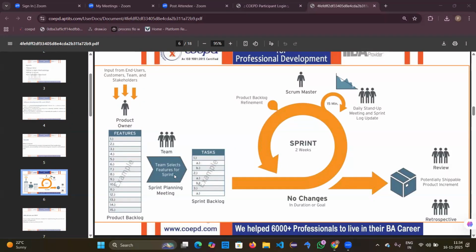Sorting means if any particular user story is repeated or any duplicate user stories are created, then he will be responsible for deleting them, and that is called sorting. Prioritization is deciding which user story to be developed first. That will be done based on the values that we got, the BV and CP values. We will analyze them and prioritize those requirements.